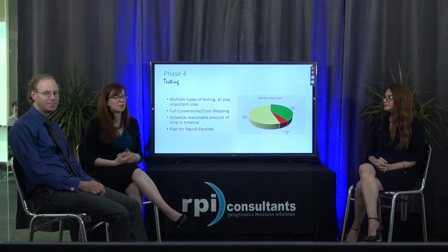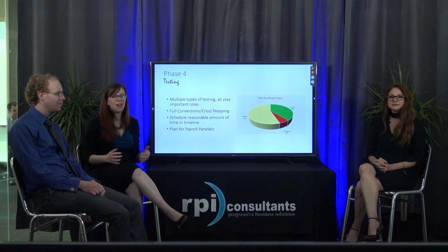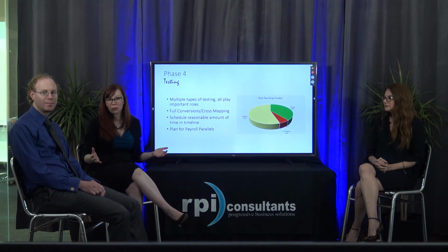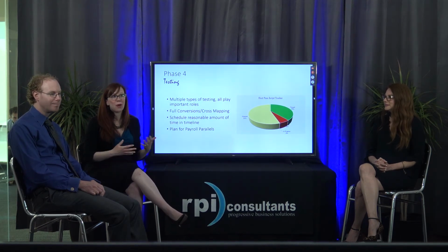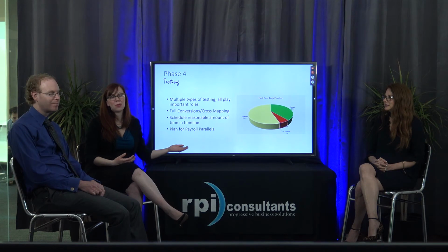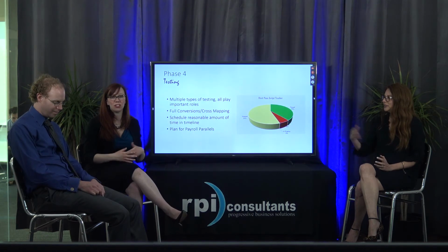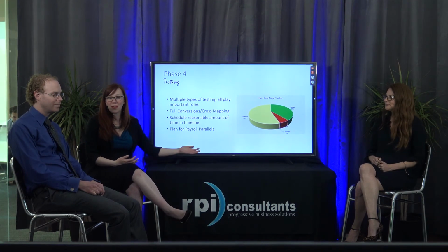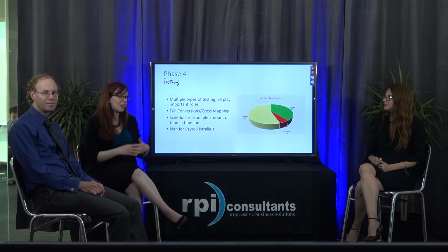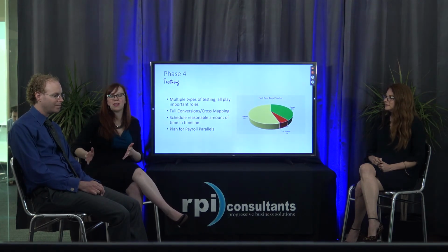Also, if you're able to look at testing as a holistic approach, the longer you can have everybody in one room together, the better it is. Because then you can do things like, okay, what would it look like today if I had to create a whole new department? And how do I then hire employees and staff up that department? What would the effect be on my payroll group? And being able to look at the system in that way, and not do just those handoffs and say, oh, I have to wait, call somebody up. And run through an interface as it would come up in the day-to-day work, instead of trying to just say, let's get this group of people in a room for 3 days and test all their scripts. And then, okay, we'll move on to the next group.